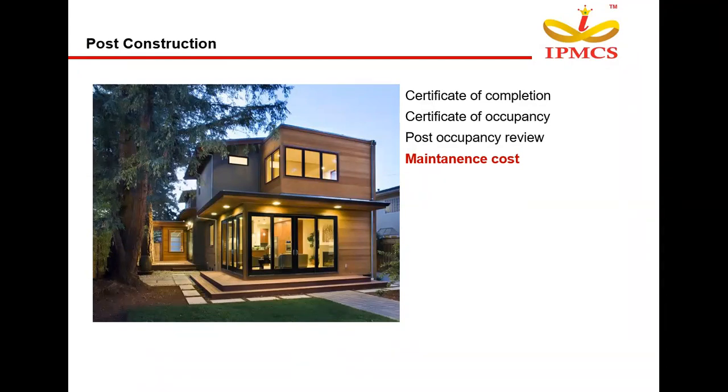And once the occupant starts residing in the project, we'll be doing a post occupancy review, and this post occupancy review will be done at an interval of 6 months. Say right today we are handing over the project to the client, and from today, after 6 months we'll do a post occupancy review, and then again at a regular interval of 6 months until 3 years after handing over the project.